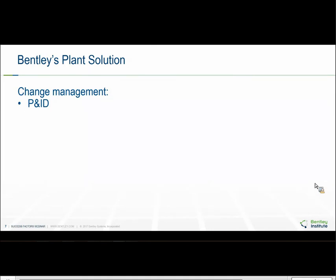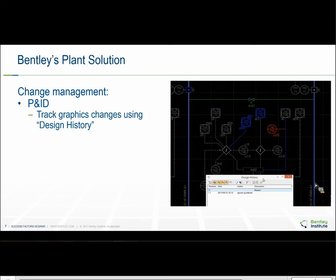We'll start with P&IDs. When it comes to a P&ID, it's critical that the P&ID on record matches the existing plant configuration — not as originally designed and not as proposed but not yet built. Meanwhile, one or more copies of a P&ID can exist in a proposed state in-house or at a contractor site. The changes to this P&ID can be done well ahead of any physical plant change. Owners need a way to visualize these changes proposed against the current set of P&IDs. Using OpenPlant P&ID, changes are tracked automatically and embedded into the document to be reviewed between any two versions. The color-coded set of changes are captured showing new, deleted, or changed portions of the P&ID.